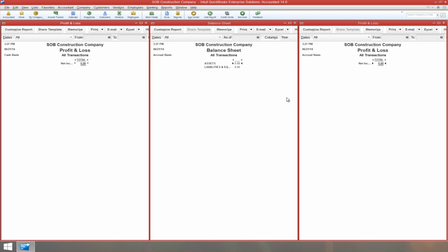So the first thing is you want to set that up right, because when I deduct retainage from an invoice, it really shouldn't impact income. Say I bill $100,000 for part of the job. The retainage is simply a reduction of what they owe, not a change to income, but a reduction to the receivable, because I'm going to collect that at the end of the job after the final punch list is completed.